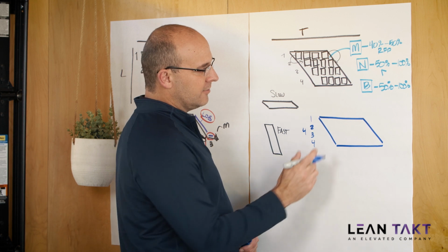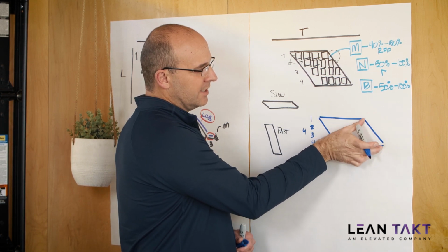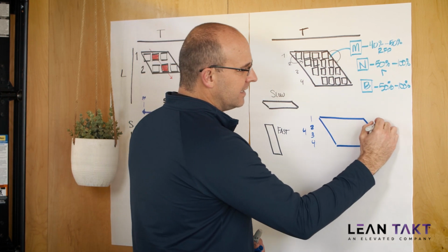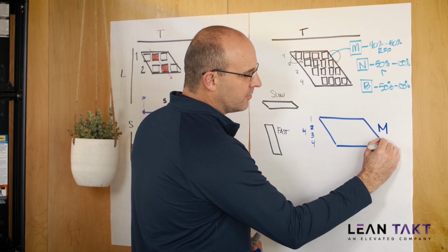Typically, on the macro level, it's going to be close to a 2 to 1 from a shape standpoint, which means that you're going at a conservative speed. So that is your macro level speed. This is the milestone that you promised to the owner.